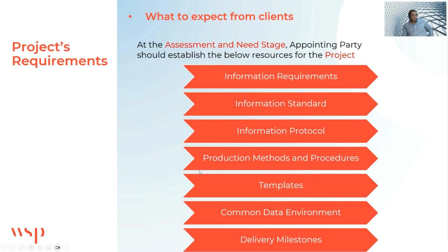Another important thing that should be delivered by the client together with project requirements, the templates. Also, they should set up a common data environment. Selecting the platform or the group of platforms and defining the process for the common data environment. The client also should specify the delivery milestones.